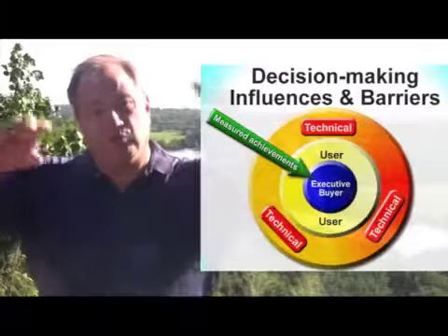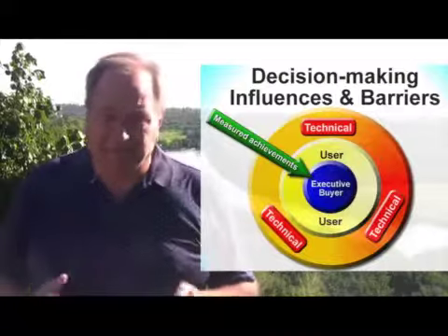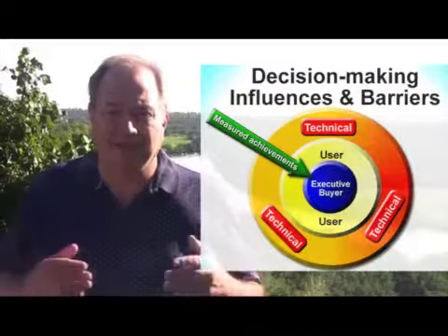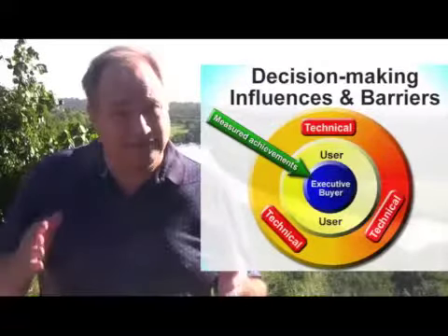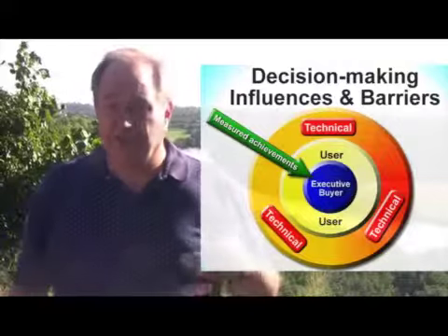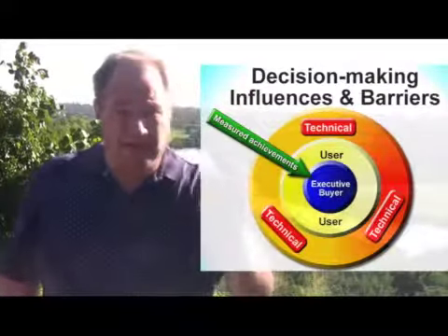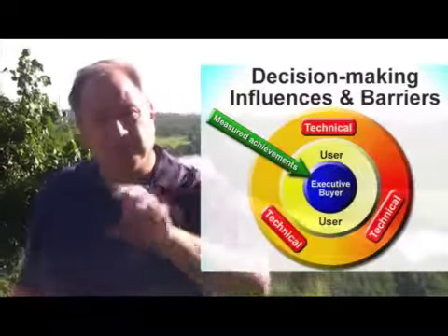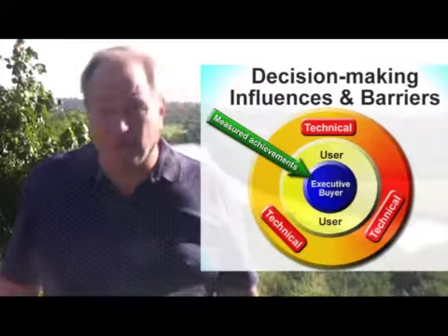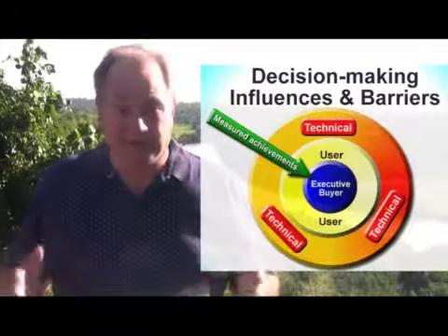And the third ring, if you will, of decision makers is our technical decision makers. They're just going to be thrilled to have those detailed, techno-geeky kinds of conversations with you about the things they are focused on, which is technical details. But that is the only group of these three, technical, user, and executive, that's going to be interested in tactical planning. The rest are going to be talking about outcomes in their area of responsibility.